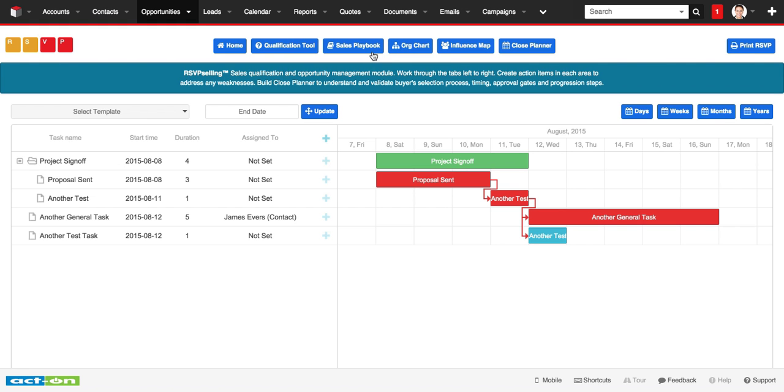Typical delays in the buying process are things like legal reviews, contracts being signed, and purchase orders being generated. Often there's a whole process. You may need to get registered with the procurement office in order to move forward. It may take 30 days for them to pay their first invoice, and you may not engage until that first deposit has been received.